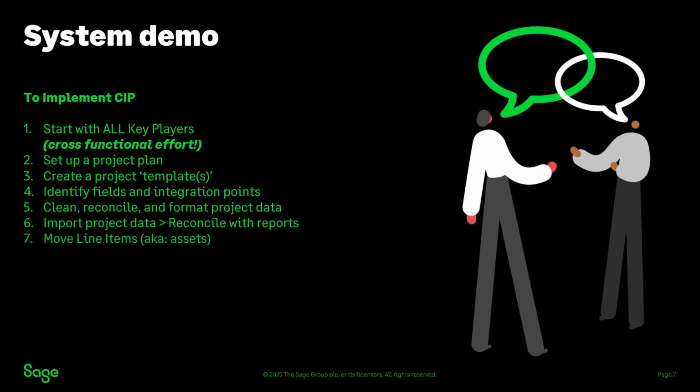So instead of 2 steps forward and 1 step back, you'll just go 2 steps forward and keep going forward. Create project templates. I often see that people have reoccurring projects, which gets back to that standardization, right? A lot of times I'll implement one project and create it as a template for everybody. And what that means is it's pointing the integration to the depreciation system, to the right company, maybe it's also including all the custom fields, field mapping, maybe some groups that are in there, all that information.